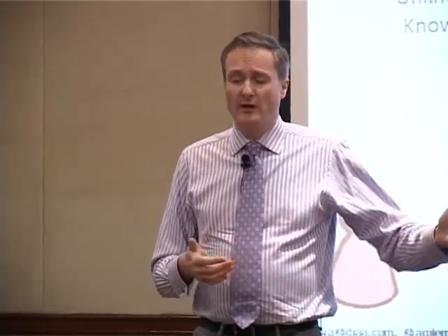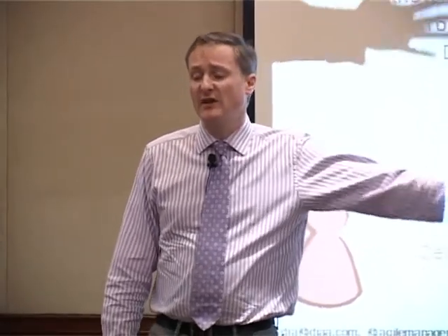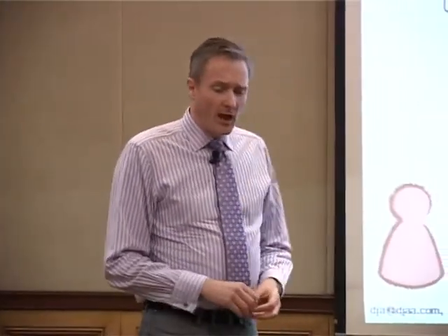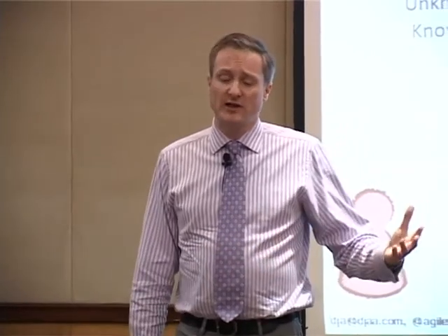So you might have observed that the average lead time for a user story is 2 days, and the tail on the distribution is between 5 and 10 days. That's a pretty typical number in my experience, small, agile teams. And you bootstrap a new project. Well, in the beginning, the average lead time is between 5 and 10 days, and the tail on the distribution is measured in weeks. But gradually, we get to know things better. Probably have an example of this. Things begin to speed up.